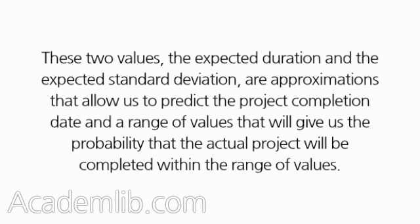These two values, the expected duration and the expected standard deviation, are approximations that allow us to predict the project completion date and a range of values that will give us the probability that the actual project will be completed within the range of values.